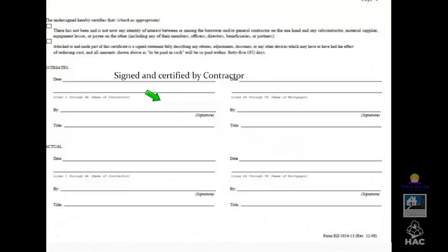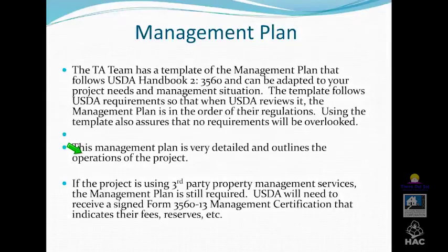Because prior to awarding the bids, you're going to go back to the office, you and the architect, review for accuracy, see if they left anything out, make sure they're in compliance with everything that's required of USDA, make sure they've provided evidence of the insurances, and then make sure they're not debarred from the federal government. Once you have all that, you're probably able to make the award.